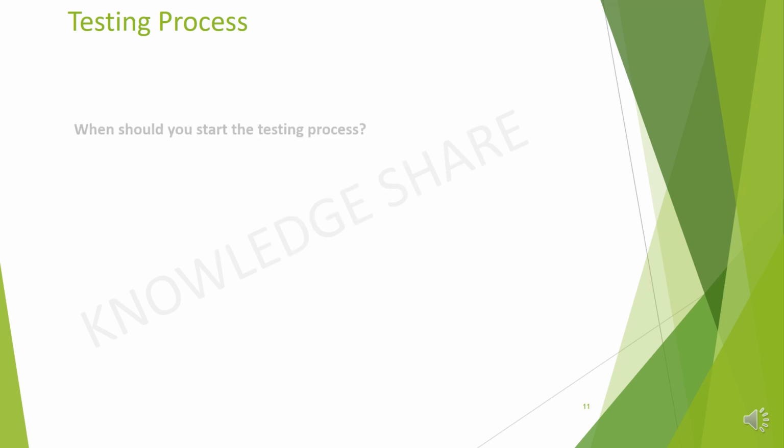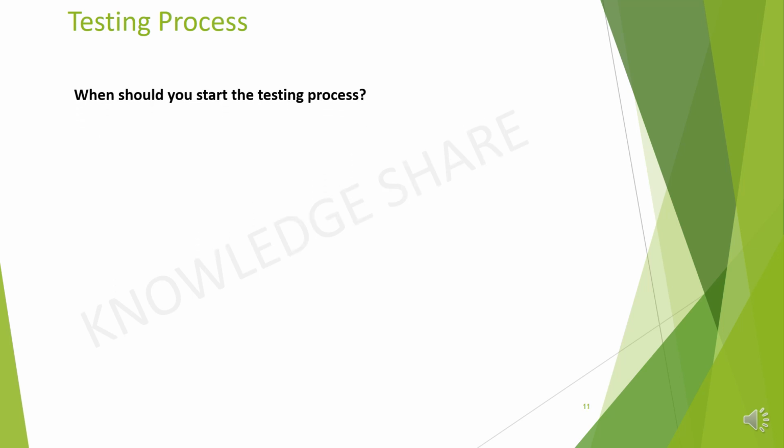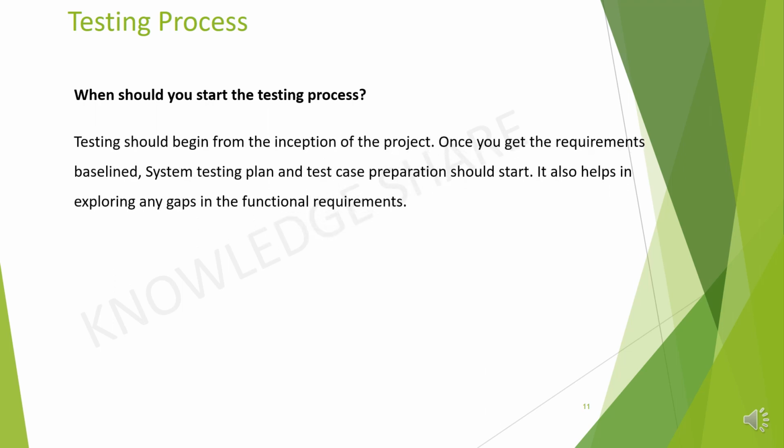Next question. When should you start the testing process? Testing should begin from the inception of the project. Once you get the requirements baseline, system testing plan and test case preparation should start. It also helps in exploring any gaps in the functional requirements.